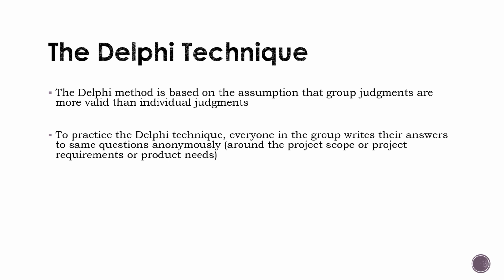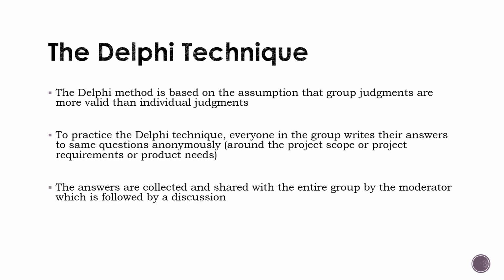You write down certain questions as a moderator or as a project manager. You design that questionnaire, and you give that questionnaire to every single person in the group. The group is obviously major stakeholders of the project. They will write their answers, and the answers will be totally anonymous. Now what happens next? The answers are collected and shared with the entire group by the moderator, which is followed by a discussion. As a project manager, it is highly likely that you will be the moderator for conducting this session of the Delphi technique, right?